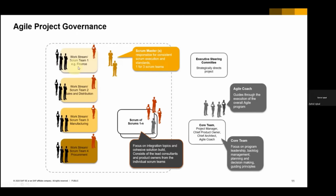Works team and Scrum team: finance, sales and distribution, manufacturing and procurement. Here is a Scrum of Scrums 1-N. They are coordinating with each other because of the four Scrums they are doing, with finance, distribution, manufacturing, and procurement. And again, the one Scrum of Scrums, with the four Scrums, will focus on integration topics and a cohesive solution,